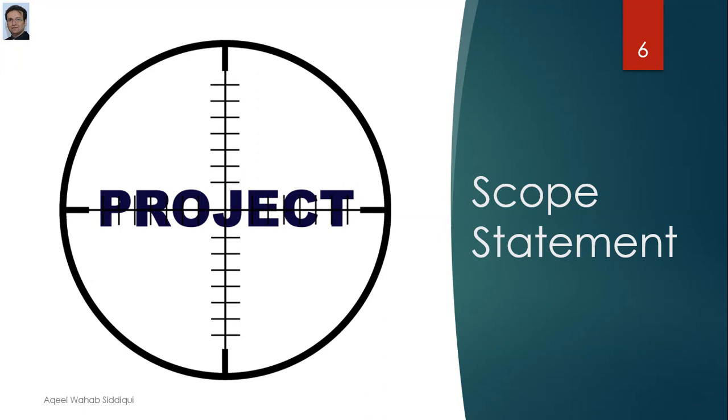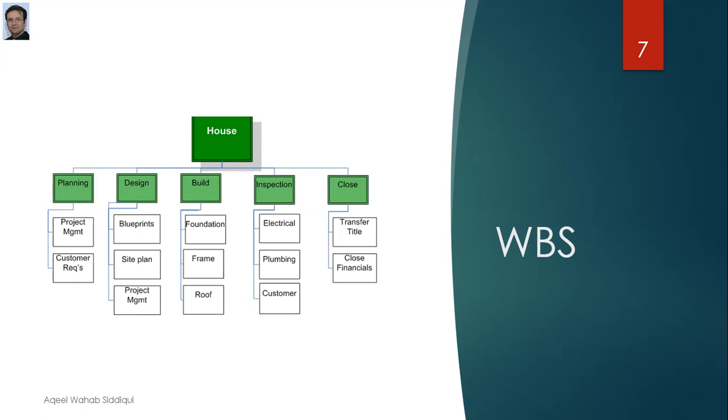Then, based on the requirement documentation and requirement traceability matrix, we try to summarize our requirements work into a comprehensive document. And obviously we also talk about what is included and what is excluded from the project. That is done in the project scope statement. We take the scope statement, and we try to explain and draw it graphically. That is called the work breakdown structure.